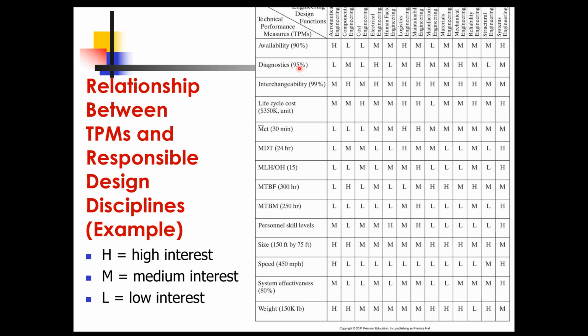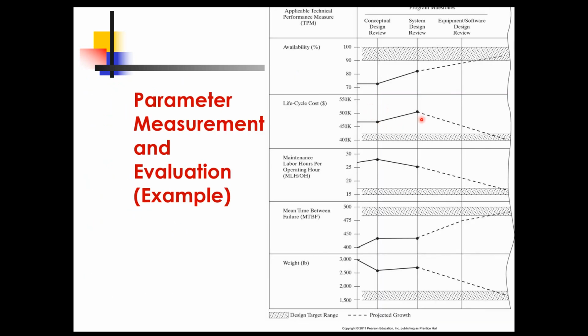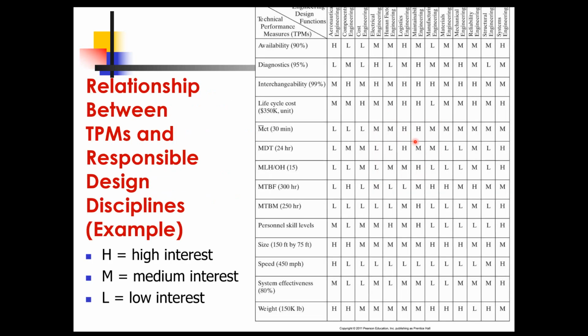So that is also very useful, because if we go back to this one and we have a problem, then if you know this responsibility matrix, you know who needs to work on it. And remember that these are complex systems, so the assumption is that this would be large teams.